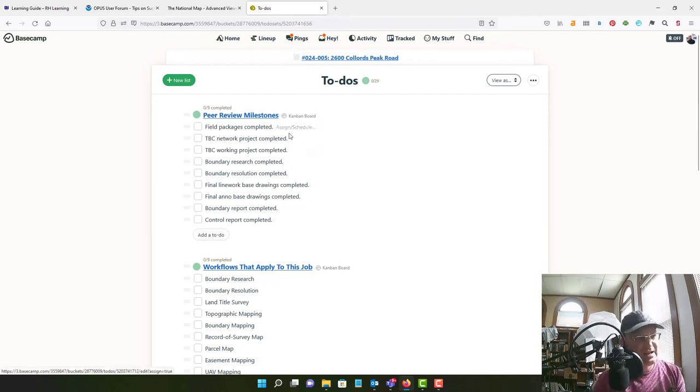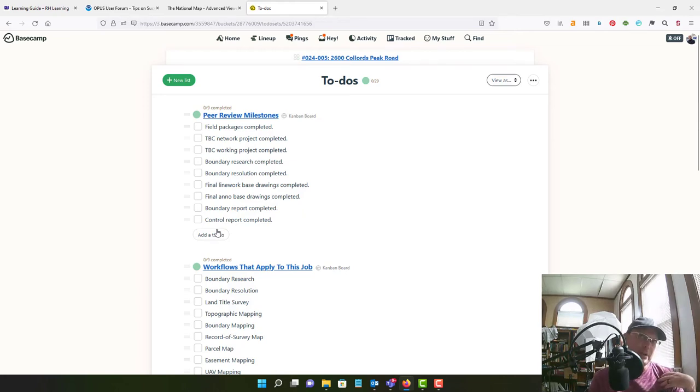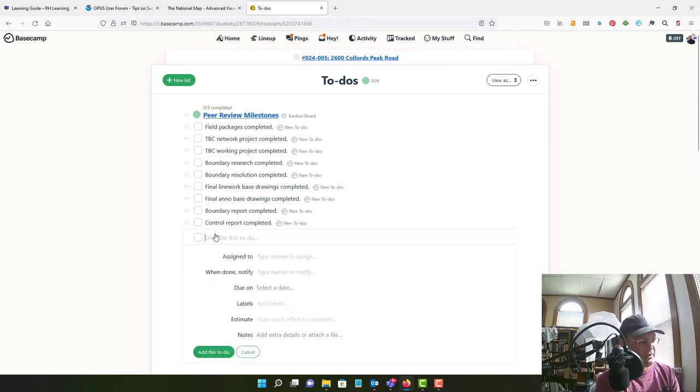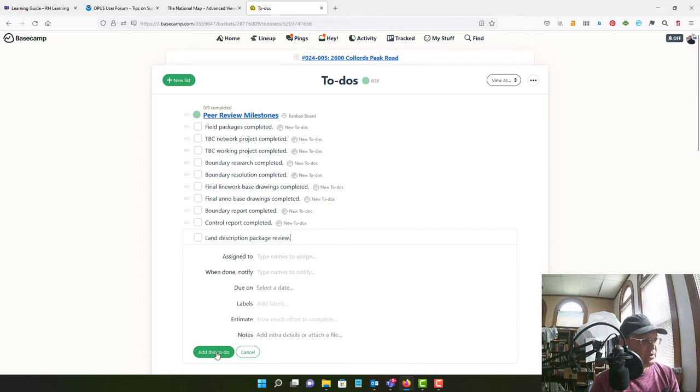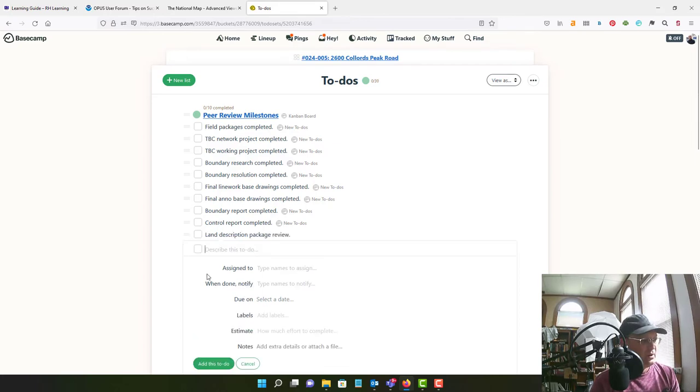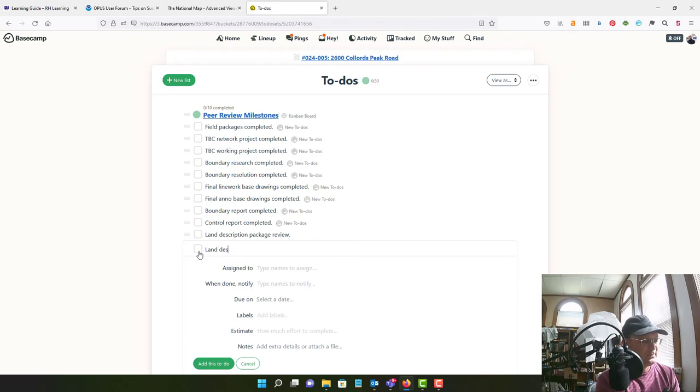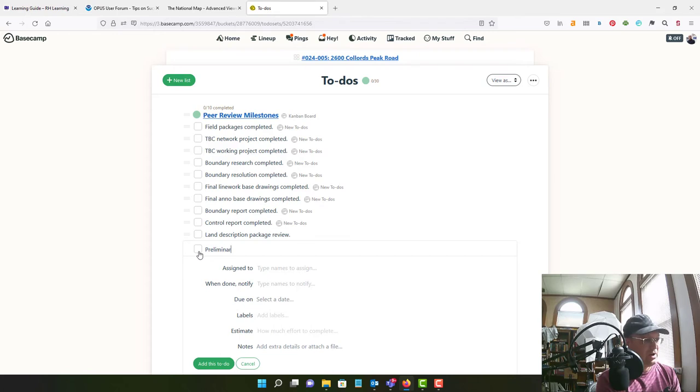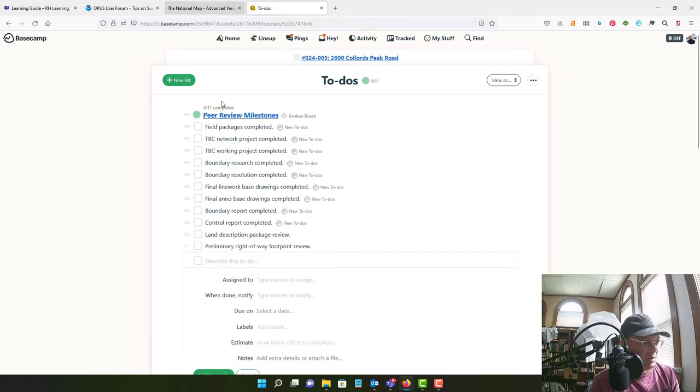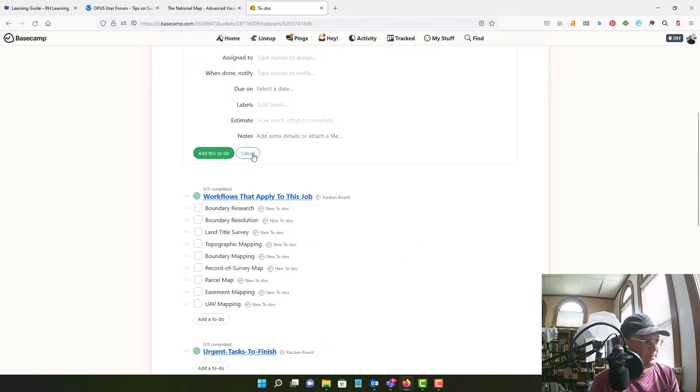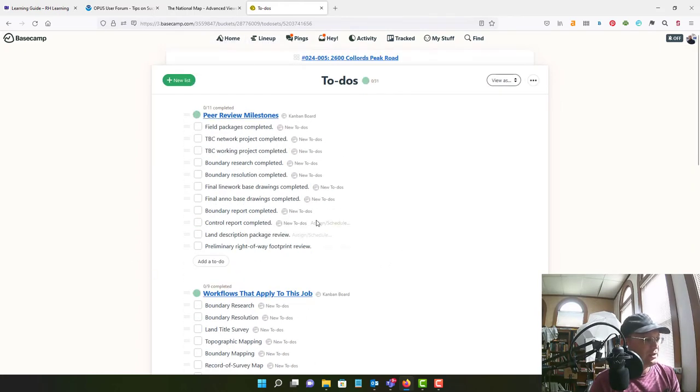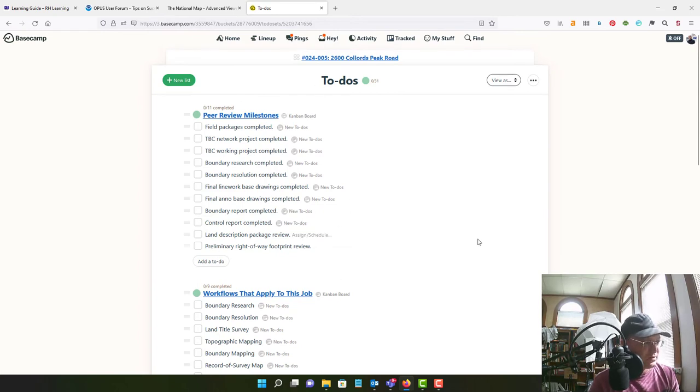Okay, now the other thing that we are going to have on this project that we don't have on every project is we're going to have land description packages. So we're going to add land description package review here and we're going to add land, we're going to call it a preliminary right away footprint review. So we're going to probably have to develop a right away footprint for this project.